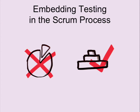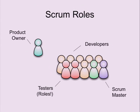To describe the Scrum process, probably some of you are already familiar with that. You divide it into roles, activities, and artifacts. And the question is, how does testing reflect in the description of the Scrum process? Roles. The main thing is the Scrum team. In the Scrum team, it's very important that your testers are in the Scrum team. Not like manufacturing, what I often see: the developer sits at his table, coding, then finishes, work goes over, and the tester does his stuff. That's not teamwork. Teamwork is everyone in the team being involved in testing.